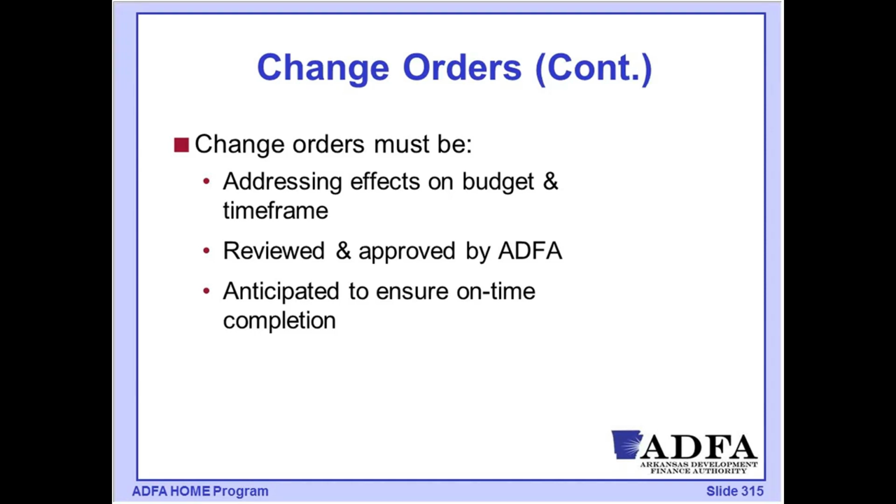A change order is not something that can simply be implemented as an agreement between the recipient and the contractor. Change orders must be reviewed and approved by ADFA. We mentioned earlier that there's generally would be a requirement for an inspection to be able to detail why the change order was needed and the ramifications of that.